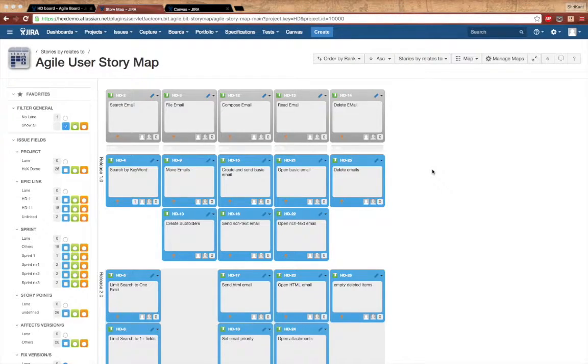One more thing over here we see is what all user stories are there in the release 1.0, 2.0, etc. So with this pictorial picture, you get a good representation of what all user stories are there under one epic, and what are there in the release 1.0, release 2.0, etc. And moving forward, you can also know what all user stories are finished, what are remaining. So this pictorial representation is a good source to see where we are in terms of the progress on the entire backlog.